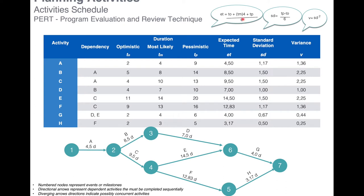Why divide by six? Because the most likely duration has a weight of four, while optimistic and pessimistic each have a weight of one — making six total. So we divide by six and get the expected time of the activity, which is a combination of all three scenarios. Here, the expected time is four and a half days.